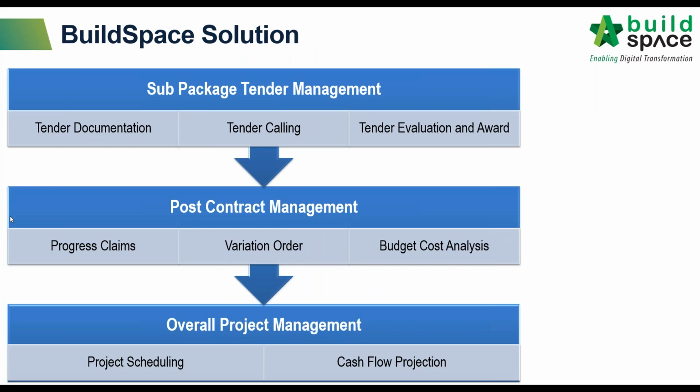For today's system presentation, we will start from the subcon tender management. As soon as we receive the main tender BQ from our client, how can we use the system, BuildSpace, to generate the subcon BQ and call out the subcon tender online instantly. Further, we can invite the subcontractors to come into the system to submit their BQ, even their claim to tender. And the tender comparison report can be auto-tabulated from the system whenever the tender is opened by the clients.